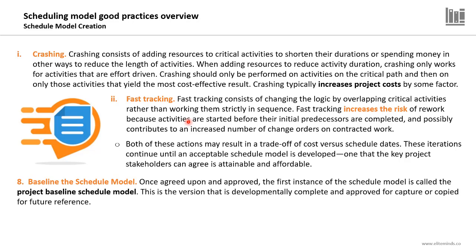Step number 8 is baselining the schedule model. Once agreed upon and approved, the first instance of the schedule model will be known as the project baseline schedule model, and this is the version that is developmentally complete and approved for capture or copied for future reference.